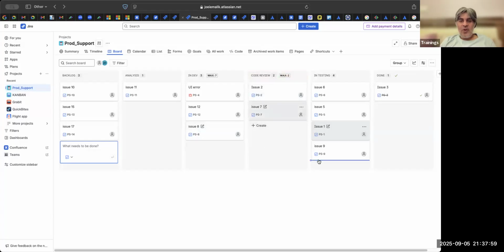But see, this flow is fine now because this guy has only 2 reviews to handle. In the morning, 1 hour, he can do it. In the evening, 1 hour, he can do it. And in the middle, he can work on his one dev task. So he's sorted. But after 2-3 days, it looks like Sudipta, who is the lone QA, is having too many tickets now. Sudipta is testing this. She can test 1 or 2 items, at max 3 items. If there are 5 items, she will be overwhelmed and tickets will not be moving.